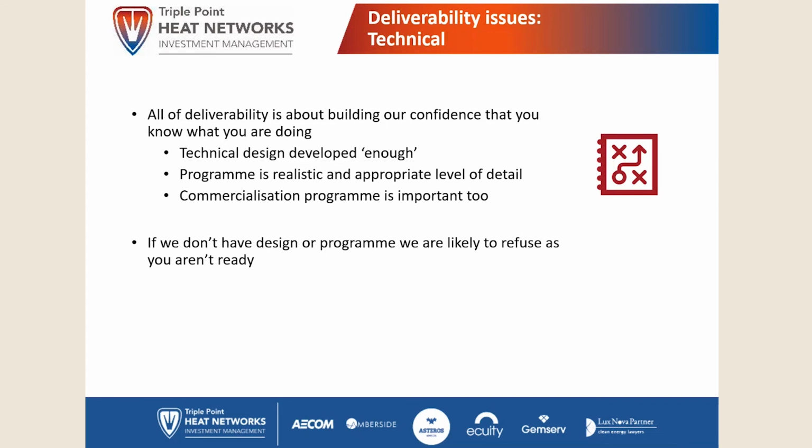Program is also important. So if you are asking for commercialization funding, then we want to see a commercialization program. Typically what people will do is provide a list of activities that they're going to undertake, the cost of those activities, and the dates or the range of dates they intend to undertake those, so that it's a sort of combined program and cost plan at the same time.